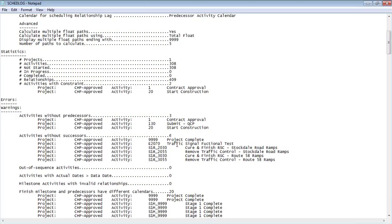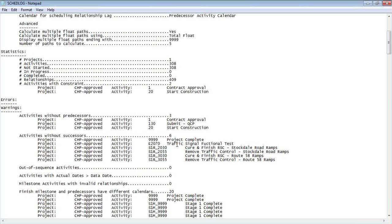Now, what I also like to do prior to my final production is I'll save a copy of this report so that if anything happens, for example, I'm going to give the electronic file in most cases to the client or the owner. So they might inadvertently do something to my schedule and then challenge me in terms of this problem. So I can show them the settings on this schedule prior to turning it over to them. It's essentially my proof that I calculated the schedule in a particular way and what my settings were when I calculated the schedule.